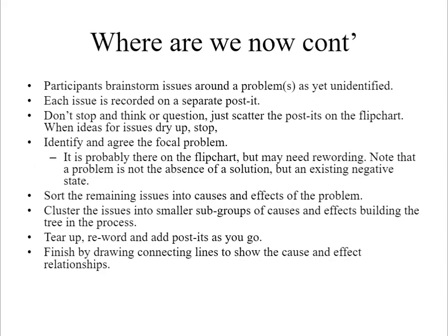In this method, participants brainstorm issues around a problem as yet unidentified. Each issue is recorded separately. Here, you are not supposed to stop, think, or question. Just scatter the post-its on the flip chart. When ideas or issues dry up, that's when you can stop. After that, you need to identify and agree on the focal problem. It's probably on the flip chart, but may just need rewording, so you can do the rewording. Take note that a problem is not the absence of a solution, but an existing negative state.